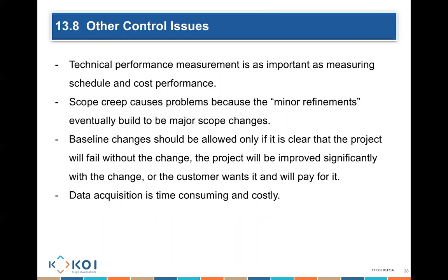Scope creep is another very important thing. We can't say it's a minor change, it's not going to be a big deal, we don't worry about it. Any minor changes are going to accumulate one after the other, and with the accumulation of all of these changes, it's going to become a major change. It's going to have a very big impact on your costing. So you have to really make sure that your costing is managed.